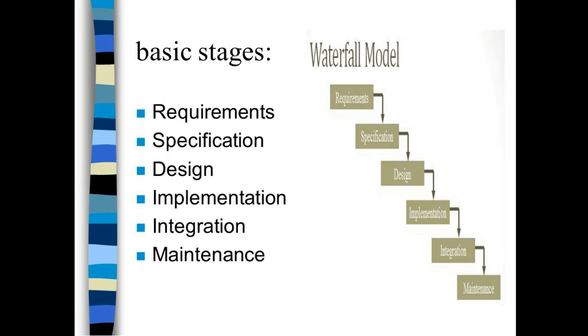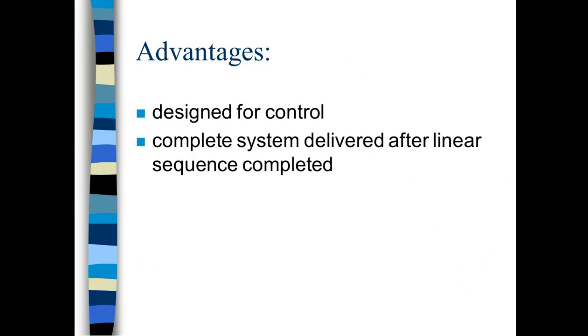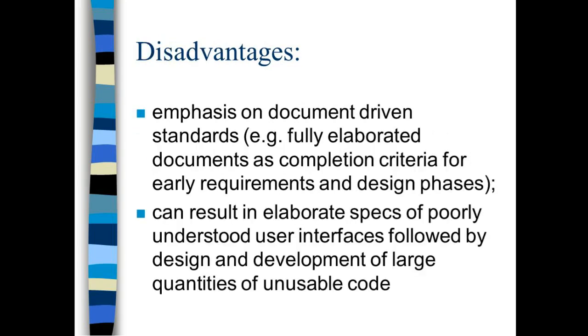Now we will discuss the advantages and disadvantages of the waterfall model. The advantage of the waterfall model: it is designed for control. It is used for a complete system delivered after the linear sequence is completed. The disadvantage: it emphasizes document-driven standards. What it means is that it uses documents that are fully elaborated in earlier steps also. It can result in the elaborate specification of poorly understood user interfaces, followed by design and development of large quantities of unusable code.